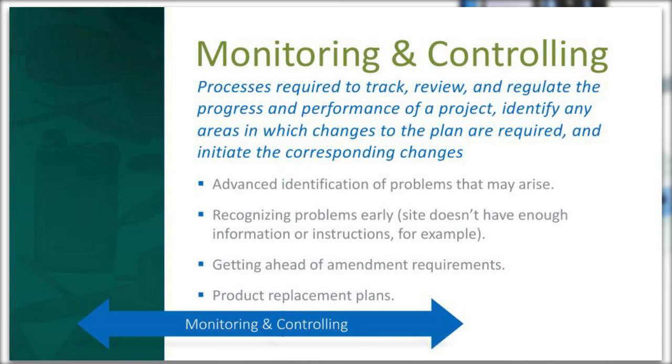So what happened was the client had to develop an instruction plan, an instruction document, so that every site was able to utilize these effectively and therefore minimize any problems or any lack of usable data that they did need in order to complete that portion of the trial.